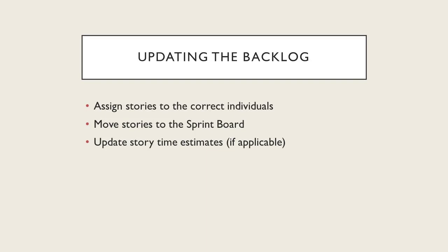Now, this can be a pro and a con, but in this course, we're going to be referring to what is called direct hours estimation. So if a story has been estimated, the developer will say exactly how many hours they think this will take. Once the priorities have been defined and the stories have been moved from the backlog to the sprint to the assigned individuals or developers based on the capacity, the sprint planning meeting can be concluded.